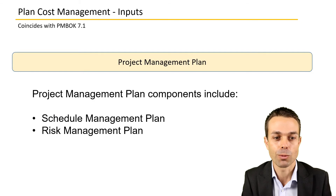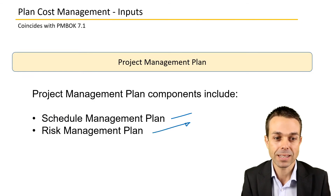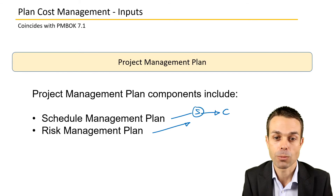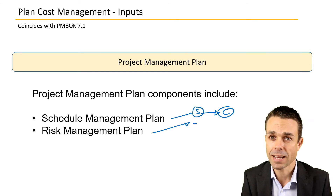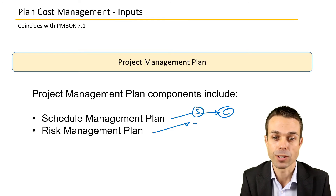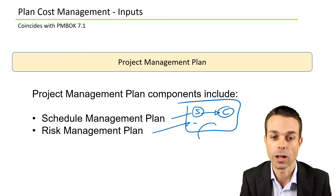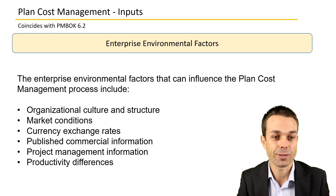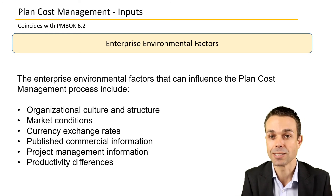The project management plan will also have input. We might need the schedule management plan and risk management plan to see how we manage those items — how we're managing the schedule can impact how we manage cost. Similarly, any identified risks or changes to the schedule will definitely impact the cost as well.